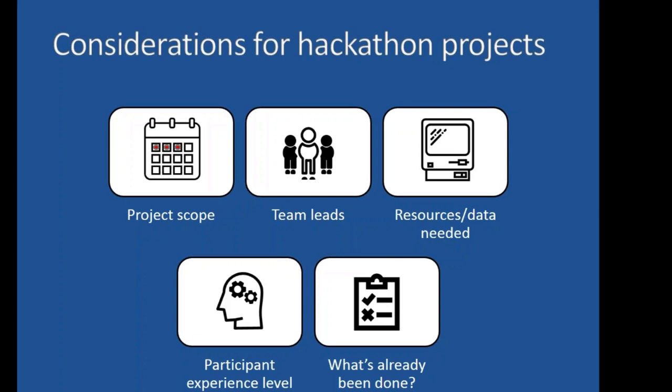Another consideration is what sort of computational resources as well as data will be needed, especially the data aspect. A lot of teams in the past have had issues with wanting to solve a particular problem, but finding that the data that they need to get it is not readily available. So this is something that may involve a little bit of background work and research to make sure that everyone's ready to go when the hackathon starts.